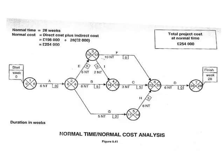The analyzed arrow diagram based on normal time gives an overall project duration of 28 weeks. The total project cost based on normal time has been calculated at 254,000 pounds — that is 28 weeks times 2,000 for indirect costs added to 198,000 in direct costs, giving a total of 254,000 pounds.